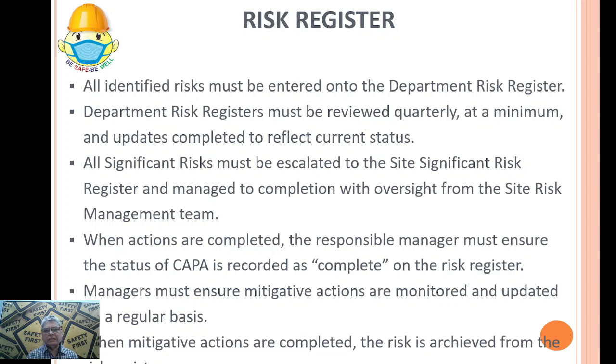So when actions are completed, the responsible manager must ensure the status of CAPA is recorded as complete on the risk register. So if you have completed it, then there has to be a remark in the remark column that it is complete.